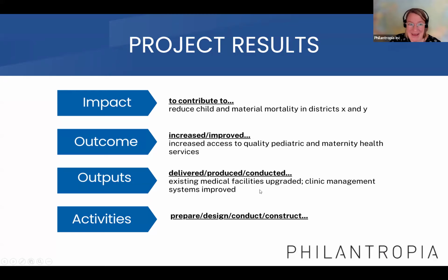The outcome is midterm. So describe something that should have happened within the target group later. The buzzwords that you would use here are increased, improved, because they've learned something and thus changed their living conditions, changed their attitudes, etc. And for the impact, you would only use the words contribute to, because again, that is a huge goal on the society level that your project can definitely not reach or achieve by itself.